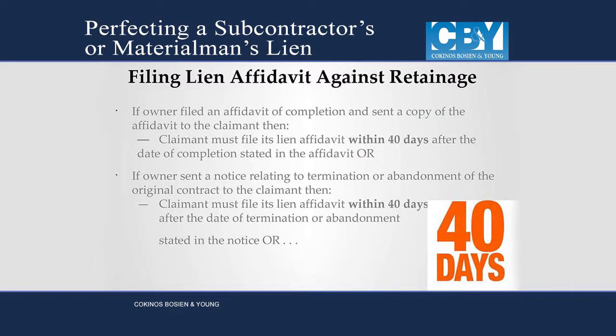Retainage. I think the retainage affidavit is probably the most complicated as to when it runs from, because it's a different deadline than your basic liens. Your basic liens, always remember the 4th month, as far as the affidavit itself. But your lien against retainage, your notification deadlines are very complicated, and your filing deadline runs from a different date.